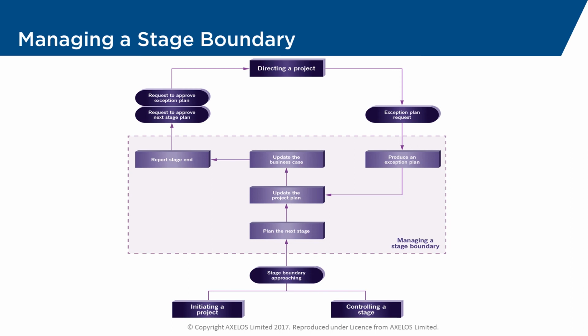So we're going to carry out the closing a project process. That's where you're going to close down the project and hand over the products to the business. But once that's all done, then we're going to the project board with an end project report and that benefits management approach. Both of these will need to be signed off in closing a project process, so authorizing project closure, for us to then get the end of the project authorized.